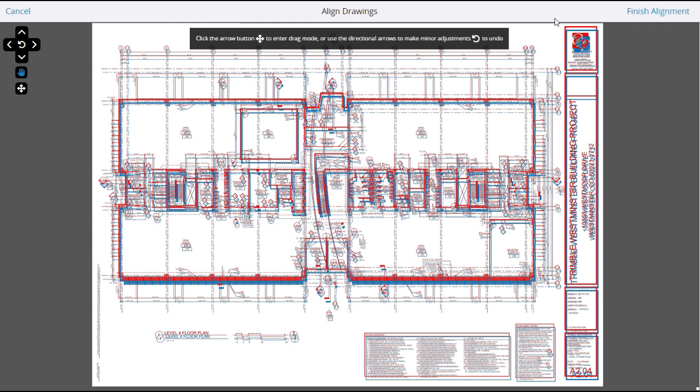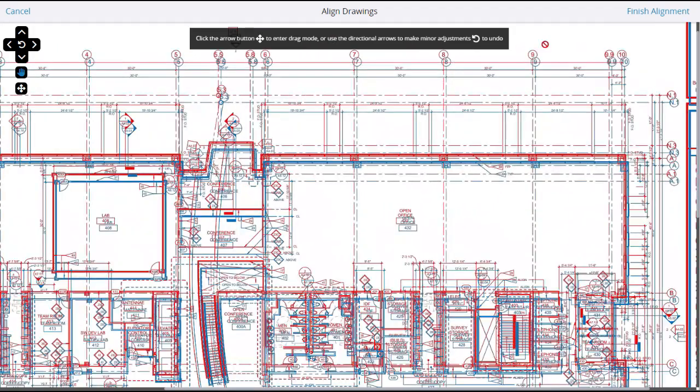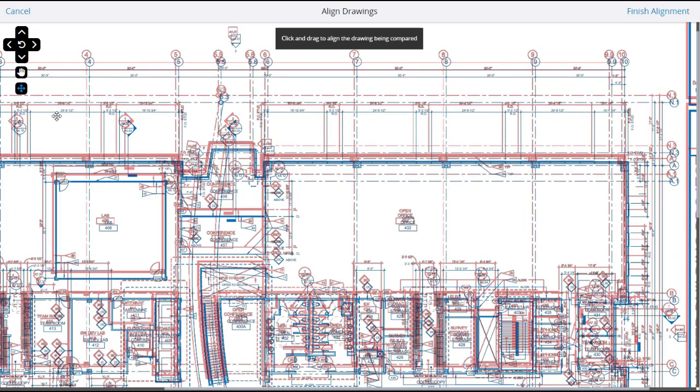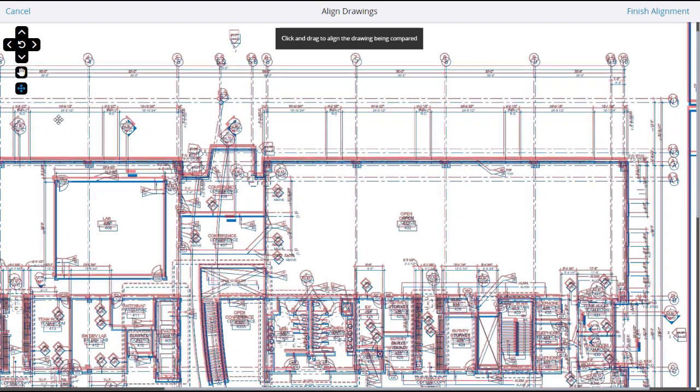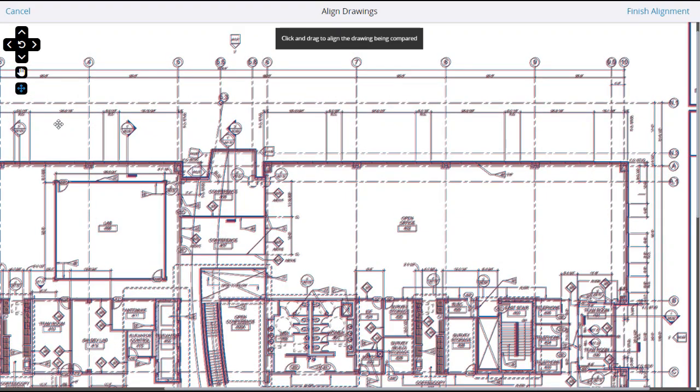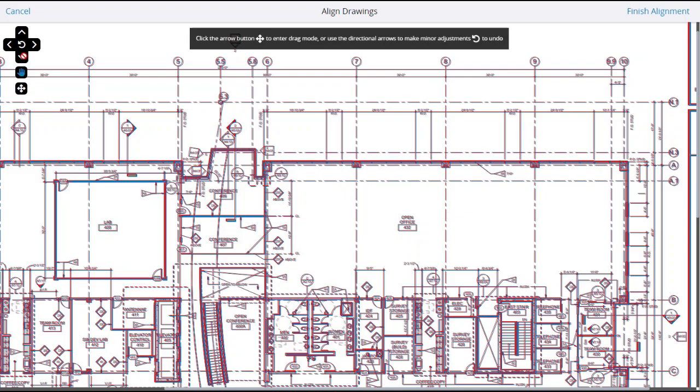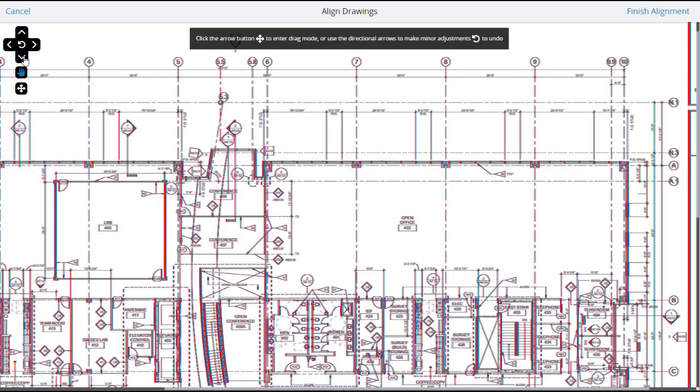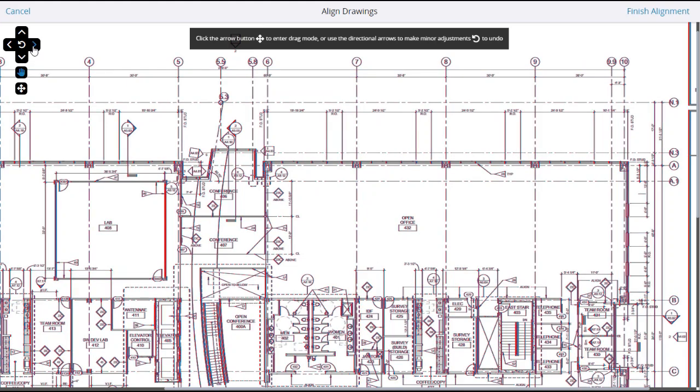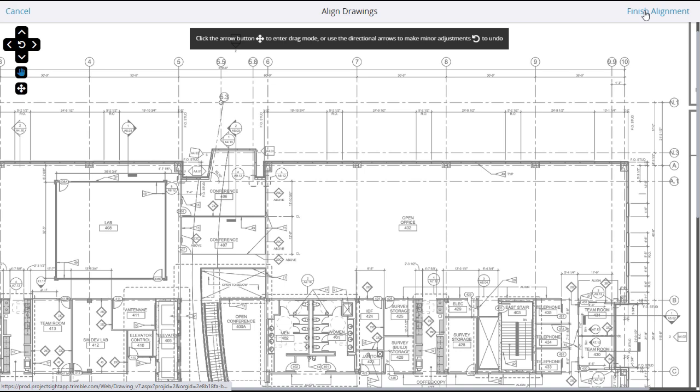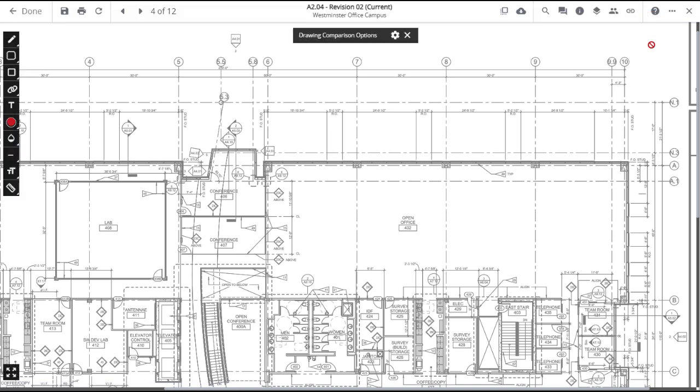First, zoom in to a level that clearly shows the misalignment. Then click on the Alignment tool and use it to drag the images into alignment. You can fine-tune the alignment using the Nudge panel. When finished, click Finish Alignment in the upper right.